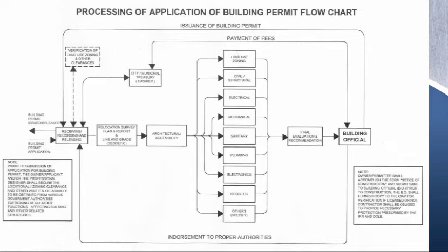And if kompleto na lahat ng plans, ipapasa na and sa next step na, which is the final evaluation and recommendations of these plans and specifications. In this part, pwedeng magkaroon ng revision and magbigay ng recommendation ang building officials sa landowners or sa applicant. And after maipadala at naparating sa building official, the next thing that will happen is the issuance of building permit. And marireceive na ang mga papers in which in this box, receiving, recording, and releasing.